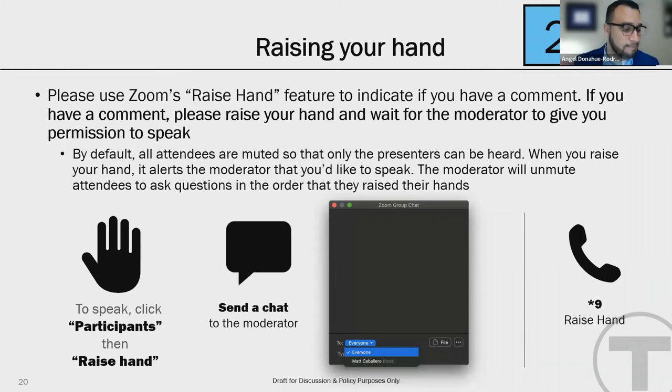Yeah, just to support that response, as mentioned, the commuter rail stations are fully funded through 100% design currently in the CIP, which includes $12.7 million to support that initial effort. And we continue to explore opportunities to support the full construction funding for these very important three station projects. Okay. Thank you.